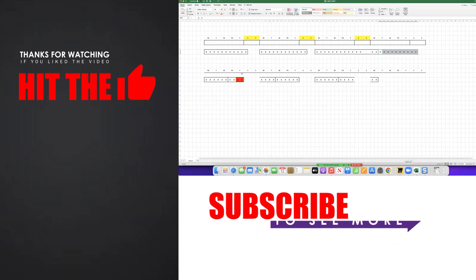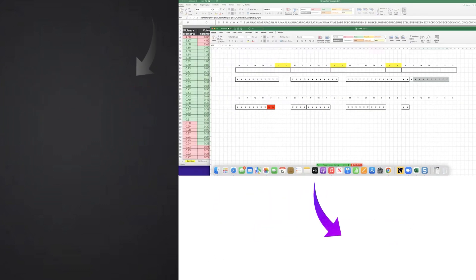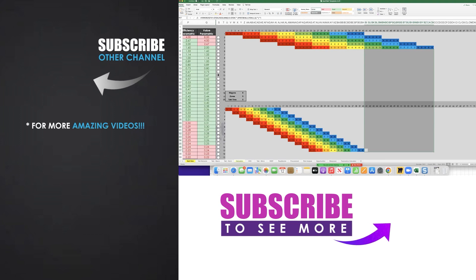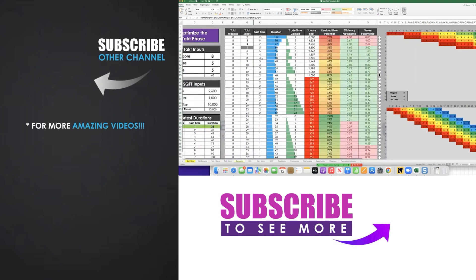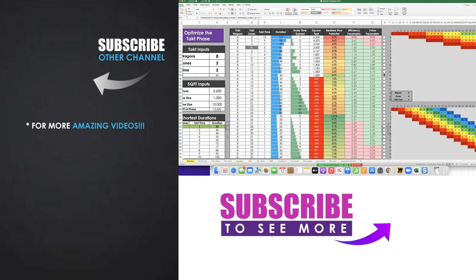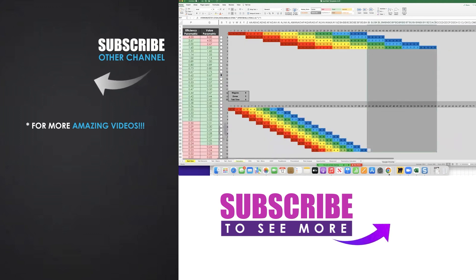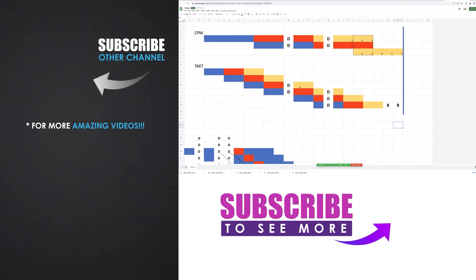Where did we get those buffers, you ask? I'm glad you asked. Right here with the optimization. We were able to identify the ideal number of tact zones, eight versus five, that got us to finish in enough time to where we actually had buffers within the system. That's the genius of this.